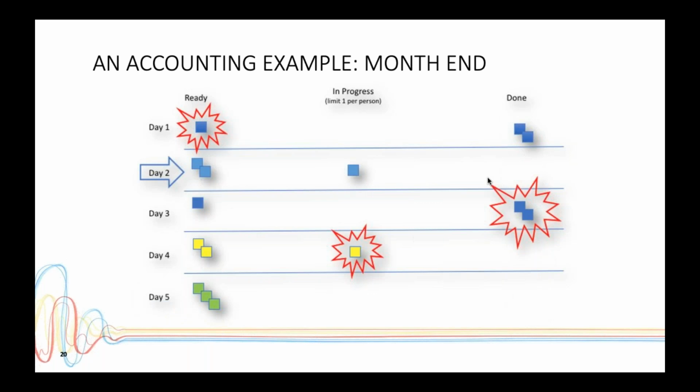What it looked like was this: when they first started, Casey would start doing some tasks and finish those, but then she didn't really know how to do any of the day 1 tasks. So she would start working on something for day 3, even though it was still day 1. And maybe someone else would start working on a day 4 task because that was their area of specialization. And by visualizing it, it became very apparent that people were not doing this in the optimal sequence,